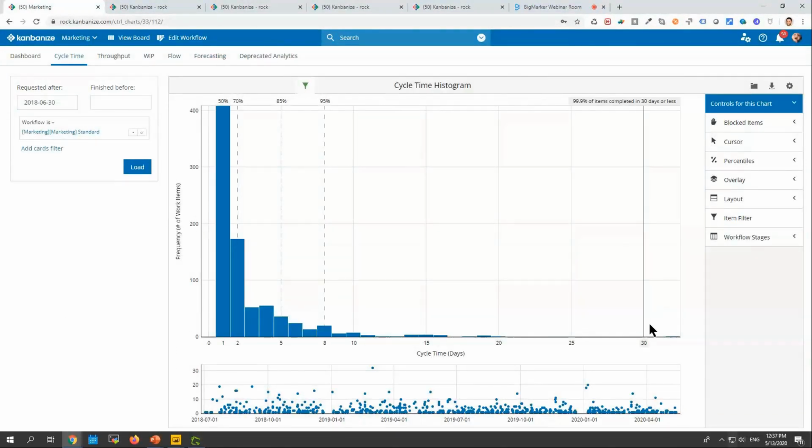If you remember, I was telling you, try to keep this tail shorter. Try to finish work always within some certain period of time. This is right sizing. So if something is very big, well, break it down into chunks of work and then flow it through the system for 8 days or less.